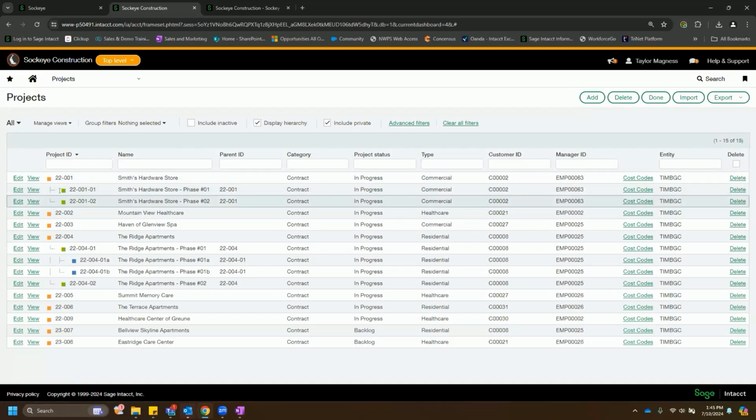So we can define those hierarchies and these can go up to 10 levels deep. So in this case, I've only got three, right? Orange, green, blue. But this could go 10 levels deep in that hierarchy. I don't know if that's ever a goal for anybody, but should you need to capture that level of granularity, we can. And then obviously, under each of these jobs, we would have our work breakdown structure, right, with all our cost codes and cost types.